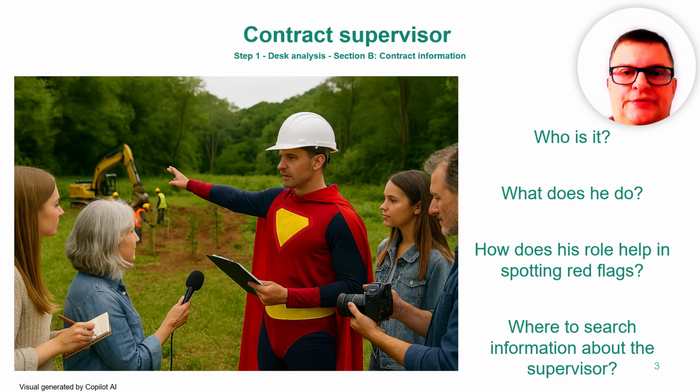They don't just observe, they prepare reports describing what's going on, what has been completed, and how the work was carried out. These reports are more than just paperwork. They're a valuable source of information about whether the contract is being implemented properly. They can also reveal red flags, warning signs that something might be wrong, including possible corruption schemes. And here's an important point. Sometimes the contract itself says that supervision must be in place. If you go to the site and find that no supervisor is actually there, there's a major red flag.